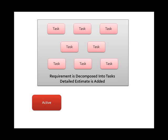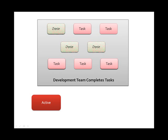Once a requirement has been made active, it's decomposed into tasks. The detailed estimate is then added that is the sum of the estimates of those individual tasks. Over the course of the development iteration, tasks are going to get completed.